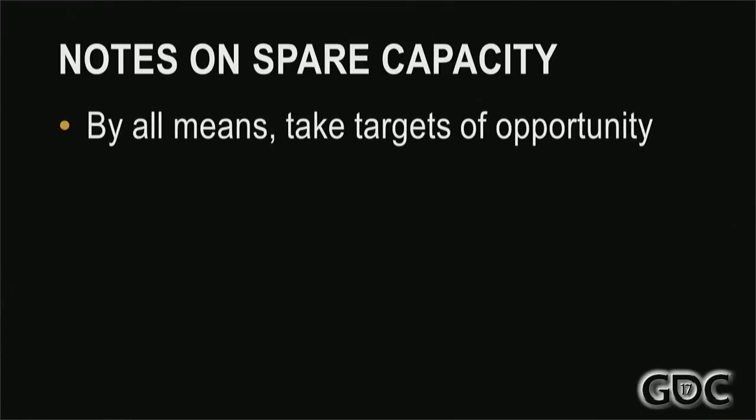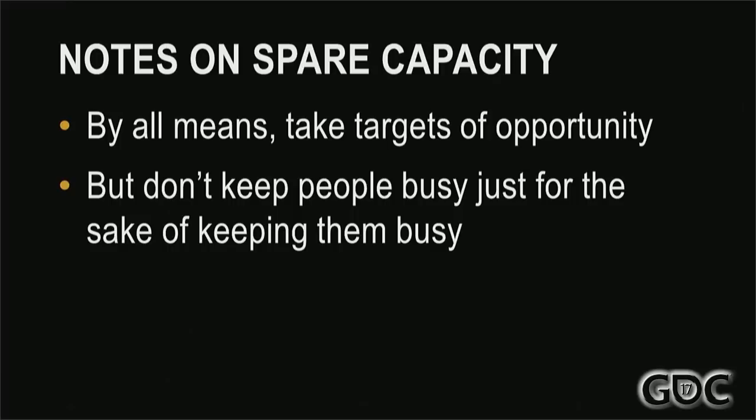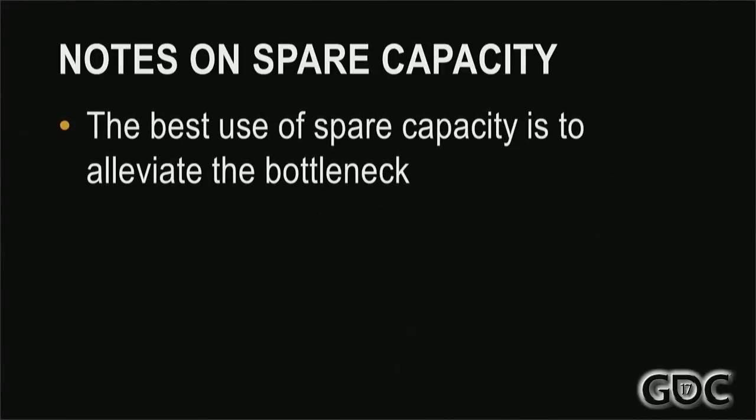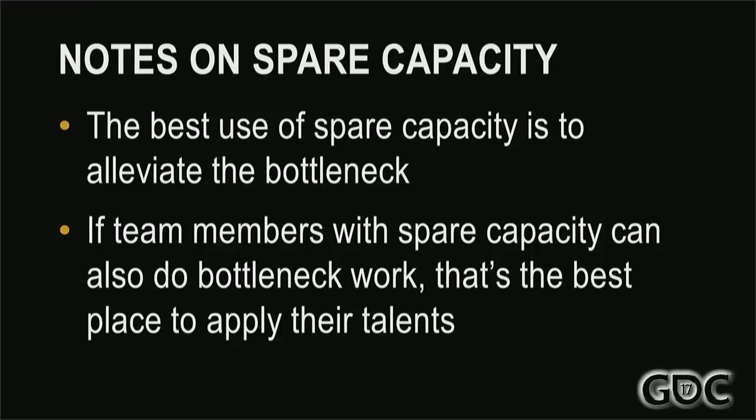By all means, take targets of opportunity, but don't keep people busy just for the sake of keeping them busy. From an operations science perspective, the best use of spare capacity is to alleviate the bottleneck. So if you've got people with spare capacity who can do bottleneck activities, that's the best place to apply their talents.